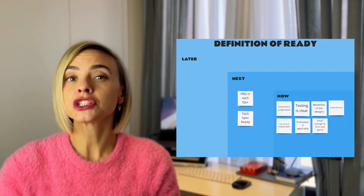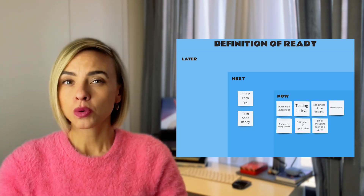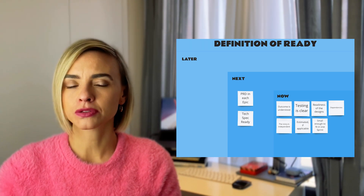And now, let's take a look at Team Planner. This team is careful about the stories they put in their sprint. After a few failed sprints, they decided to write a checklist to remind themselves what a story should look like to be allowed to be added to the sprint. This is called a definition of ready. They use it as a guidance while refining the story. As a result of an increased understanding of the common pitfalls, they improved the refinement process to avoid last-minute additions and frustration.